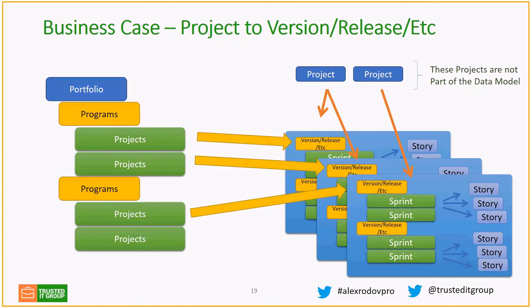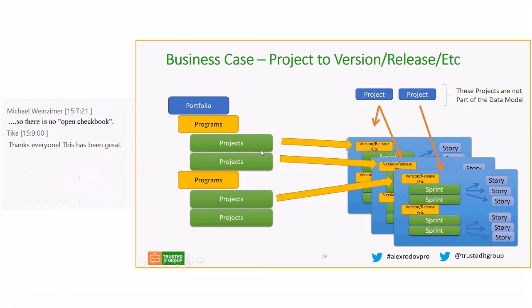And as you can see on the left side, you can combine some of these projects into more like products, or applications. So you may have another link over here between projects and programs. Maybe I can have my bigger application, and then I have projects which are releases, and you can have them ongoing one by one. So you can roll up overall program progress and see how many versions and how much time and how much actuals have been incurred by these versions, etc.